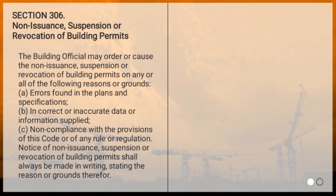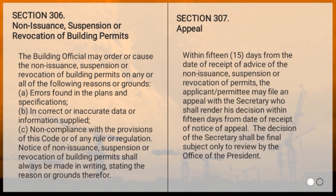Section 306, Non-issuance, Suspension, or Revocation of Building Permits: the building official may order the non-issuance, suspension, or revocation of building permits on any of the following reasons or grounds — errors found in this Code or any rule or regulation. Notice of non-issuance, suspension, or revocation of building permits shall always be made in writing, stating the reason or grounds therefor. Section 307, Appeal: within 15 days from the date of receipt of advice of the non-issuance, suspension, or revocation of permits, the applicant or permittee may file an appeal with the secretary, who shall render his decision within 15 days from the date of receipt of the notice of appeal. The decision of the secretary shall be final, subject only to review by the Office of the President.